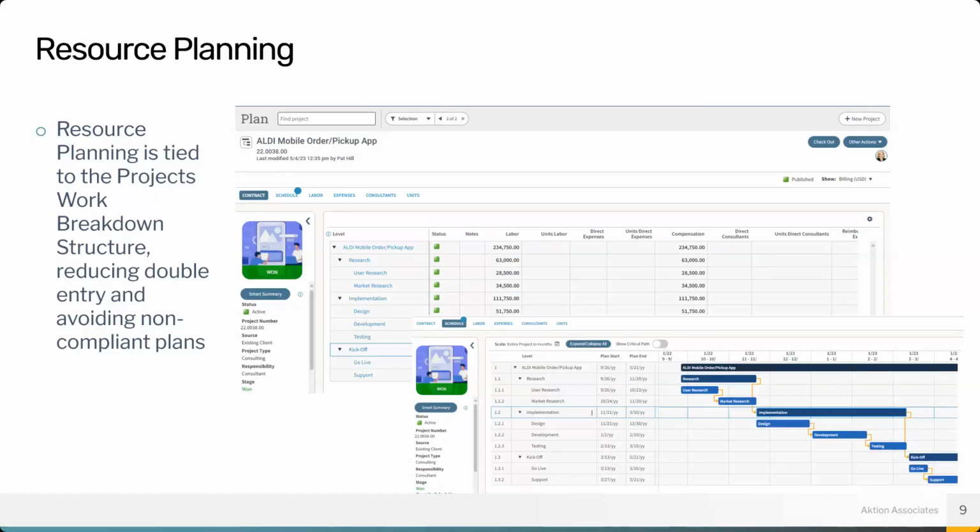Not only that, they've now added things such as the critical path. And you'll see in the second example there where you have your line seeing what drives the other. So you're able to set dependencies, which many people have requested, which allows you to simply grab the top bar, slide it along the scale and say, I want, we move the whole project out 2 months. Boom, it moves the whole project out 2 months. Seeing the critical path lets you turn on that feature when you're wanting to see what items are dependent on others to know for sure that you are going to be able to meet your schedule. Planning has come full circle.